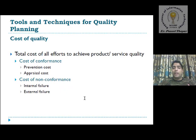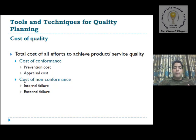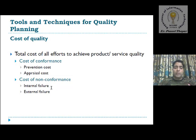One more parameter is cost of quality — the total cost of all efforts to achieve product or service quality. This includes cost of conformance, such as prevention cost and appraisal cost — what is needed to prevent the system from bugs and for appraisal of the system. Cost of quality also includes non-conformance, like internal failure or external failure. Failures are not predictable; they are suddenly generated. This is the cost of quality parameter.